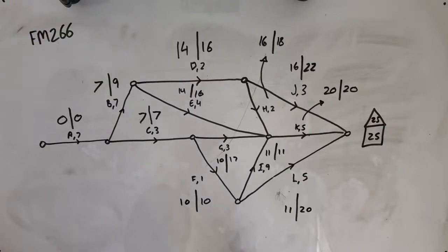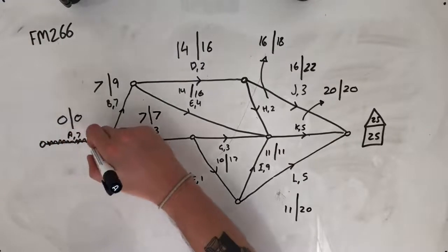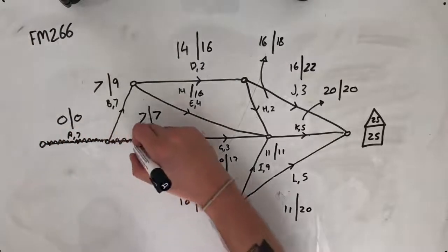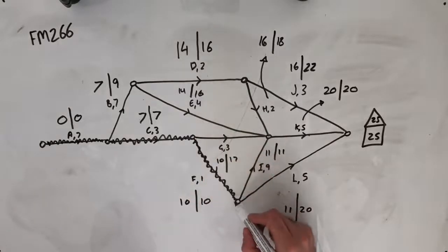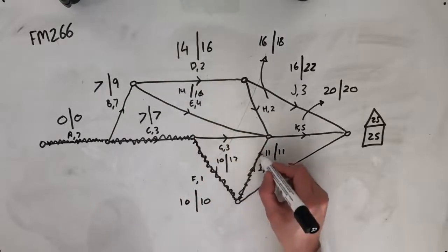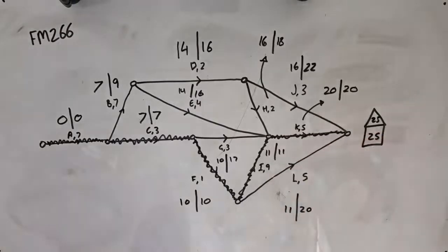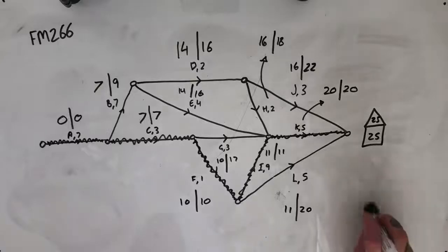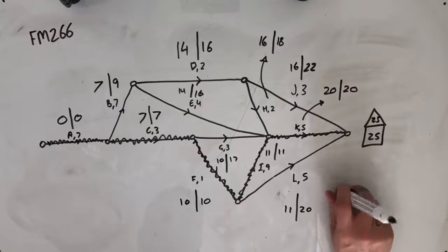So now that we have this information, we can figure out where our critical path is, by looking at the activities that have the same earlier starting time and later starting time. So we can see that our critical path moves along here. Now, what we're looking for when we're trying to figure out where the other two potential critical paths could be is two paths that have the same float time at the moment, potentially.